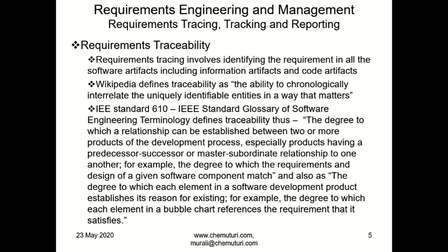Not only code artifact, each requirement must have one or more test cases to ensure that the requirement works properly. All this tracing from user requirements to software requirements to design to code, and from code to testing and test results, test cases, testing, test logs, and final acceptance testing. All this must be traced from the user requirements to the end delivery. That is tracing.